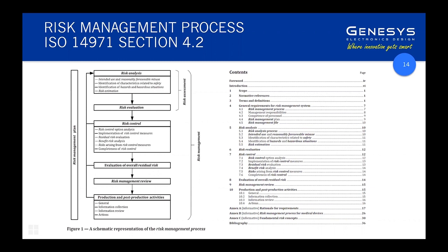I'm probably about time to jump over this, but I'll just finish the summary here that after applying risk control, you then have to look at the overall risk. So taking all the risks together, what is the net risk? Because you can't just look at the risk in isolation and work out the total risk to the patient. Then a formal risk management review, and then decisions are made about, can we proceed down a certification path with that product based on that risk profile?